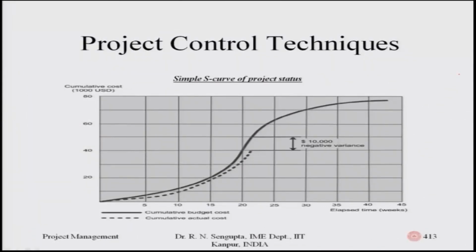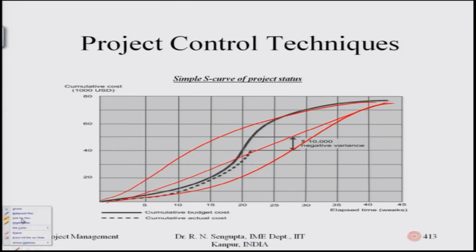This S curve which is in front of you is exactly the same. Here you have the elapsed time duration along the x axis, the cumulative cost on the y axis, and the overall project cost. Consider the early start and the late start; you had fitted the best fit line between both of them, so that you are able to utilize the resources at an optimum average value. If there is any increase or decrease of the cost, which I am now marking with the highlighter, it can be either below or above.